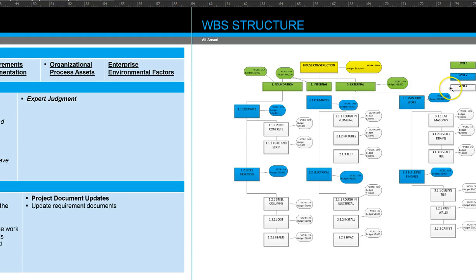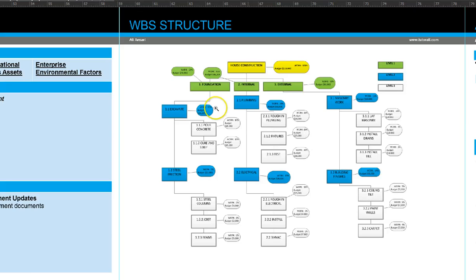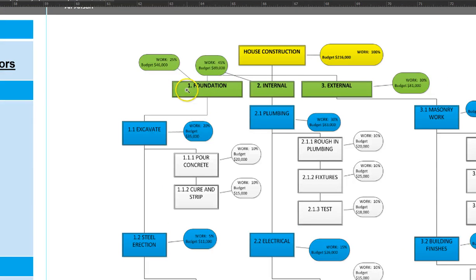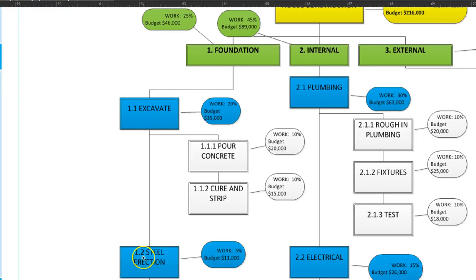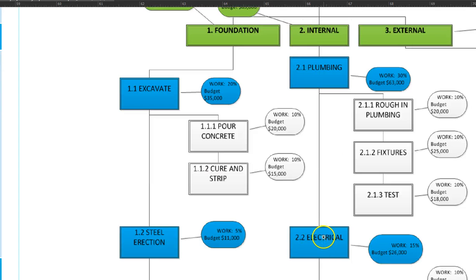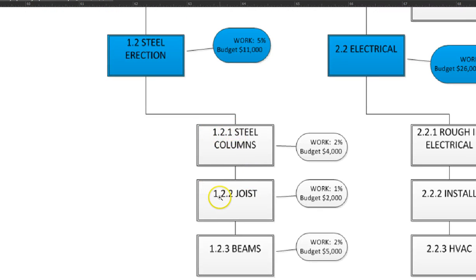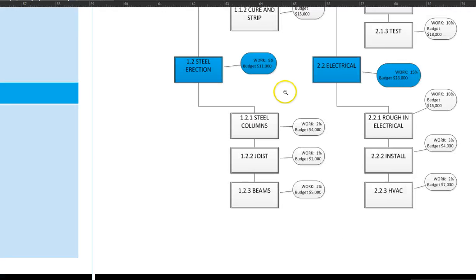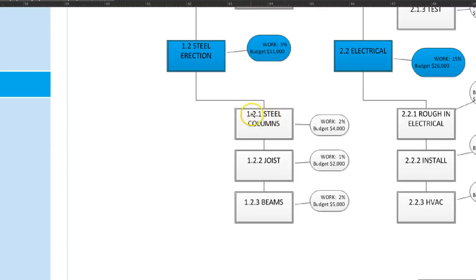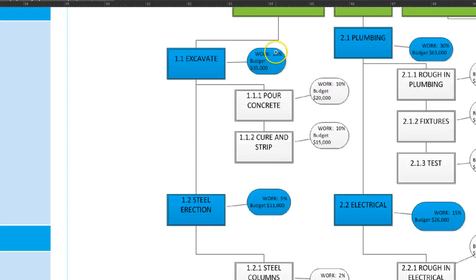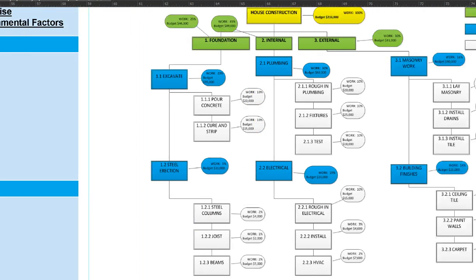In this example we have three levels; it could be four depending on how detailed your project is. These are numbered accordingly: level one uses a single digit (1, 2, 3), level two uses two numbers (1.1, 1.2, 2.1, 2.2), and level three uses three numbers (1.2.1, 1.2.2, 1.2.3). Just by looking at the numbers you immediately know which level of the work breakdown structure you are on.